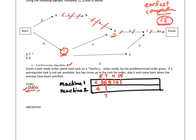So the reason I put it on there is because maybe I can start E then, because F is next. So in my process here I'm just going to put F out here for six units like that, and then I can take my E and I can place my E down here. And E is just two, so this would be nine. Now double check that I did all my prerequisites. The biggest one here is E has to be completed after C. Yep, I did that. And notice that this number here, whoa, how did I do? Not very good. And so we need to try to get a more optimal solution, and maybe if our list processing algorithm was in a different order maybe we would do better. And I did forget something here, I forgot my H, and so I still need to finish my H, that can be completed any time. So that would be three units, so I'm up here to 12.